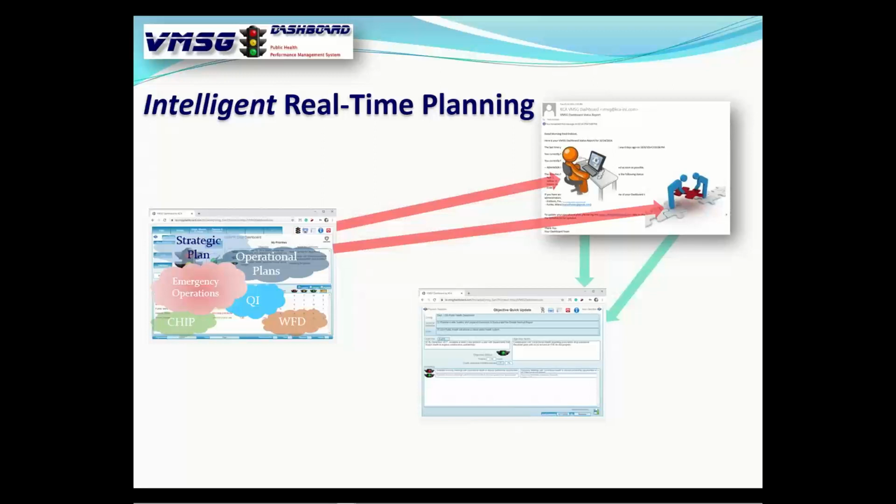It's going to cycle you through all of the particular activities and objectives you've been assigned, and then you log out. Just to give you an idea, if you have a department the size of yours and the activities are all spread out amongst people who are doing them, it might take 3 to 5 minutes per person per month to do that. So instead of 1 or 2 people having to make calls and emails and all that kind of stuff, collect the information, enter it in the system, it'll happen automatically, and all those people will do it.